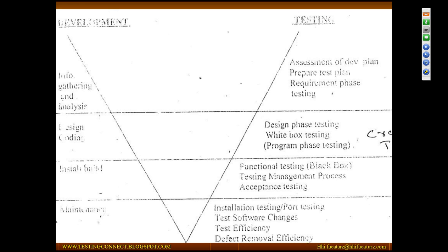Before that, one important thing: whatever the team is, in your IT company, how people frame it is like this. Freshers, more number of resources, like 5 or 6. Software engineers, who have 1 or 2 years of experience, 2 or 3 resources they will maintain. Then senior software engineers with 3 or 4 years, 1 or 2 senior software engineers. Then a team lead with 6 or 7 years of experience. That is how they will frame it.